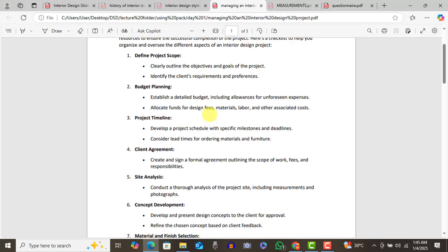So one of the things you do is that I always advise that when you are doing a project, have it in phases. Okay, yes, in phases. The very first phase is where you are looking at all these things. You need to go to site, you need to go and take measurements, draw plan, and all those things. I call it the introductory phase. Charge them for it. This is where you now be doing estimates and all those things. Let it be a charge.